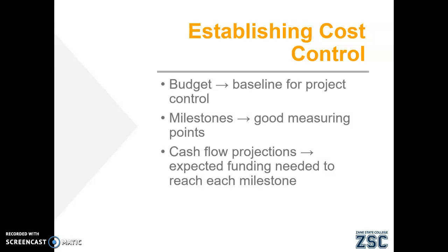Milestones present natural points to reflect and look back at the money spent up until that point, how much money remains in the budget, and making a comparison of how you're doing versus how you expected to be at that point. It may cause some changes to be made to the plan depending on whether you're on track or not.